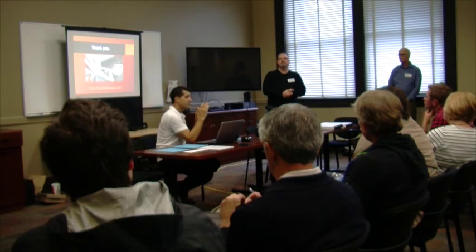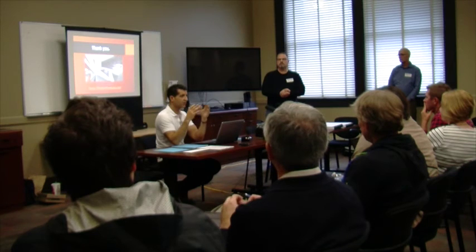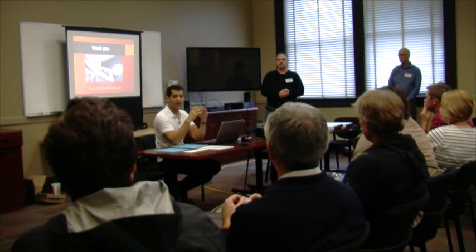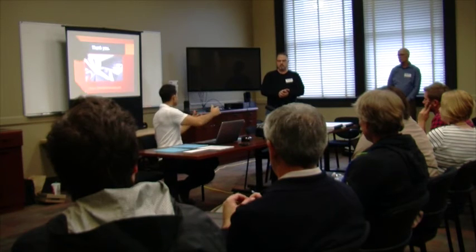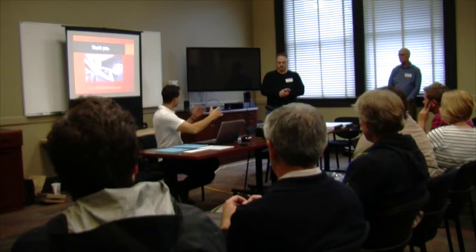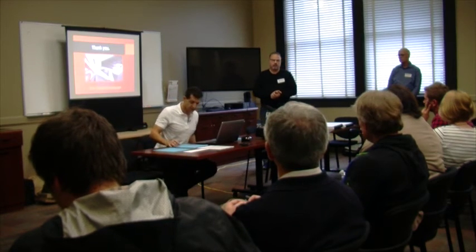And what about a certain size company? Some of the companies here may gross over a couple million a year. Some may be under that. Can you tell us a little bit about the size of the company and how that... and some folks may have familiarity with working with the union and some of you may not. So this is a good opportunity to ask the question. Sure. So there is no size standard for opting in or opting out of the PLA. It is mandatory for all subcontractors of all size.